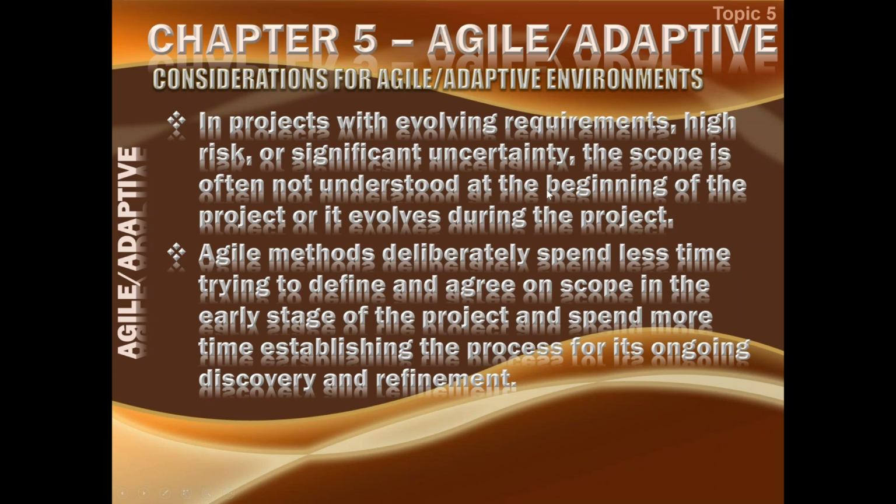and keeps changing. There is a high risk that if I fix the scope in the beginning, if I baseline the whole scope of the project, then probably it is going to change and the whole of my plan has to be redone. The whole project plan, everything will be shuffled. I can't afford that. That takes a lot of time. So why not shift to the iterative agile method, where we can only be focusing on creating that much detail